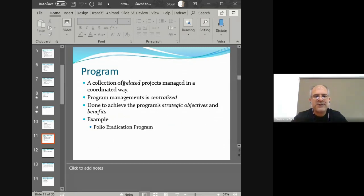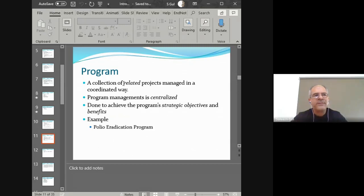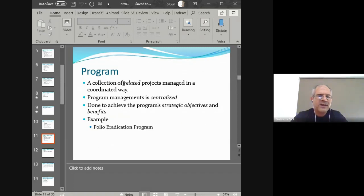Within a program you'll have many project managers, and then there is one program manager overseeing the activities of all the project managers. The program's objective is also a strategic objective, and the benefit it creates has some relationship with organizational strategy. An example in our local context is the polio eradication program or the Benazir Income Support Program — these are programs, and within them there are multiple smaller projects.